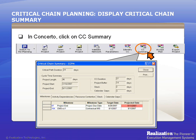After Identify Critical Chain is run, your project network is critical chain ready. Click on Critical Chain Summary to see the results. First, Critical Path Duration — this is the shortest path possible without considering resource contention. If your critical chain duration is not the same as critical path duration, it implies there's a resource shortage. Secondly, project length is the sum of critical chain duration plus project buffer plus slack and calendar gap. If there's slack or calendar gap, your project length is lengthened unnecessarily and there's room to improve to shorten your cycle time. The goal, if possible, is to tune the network so that critical chain duration equals critical path, with no slack and no calendar gaps.